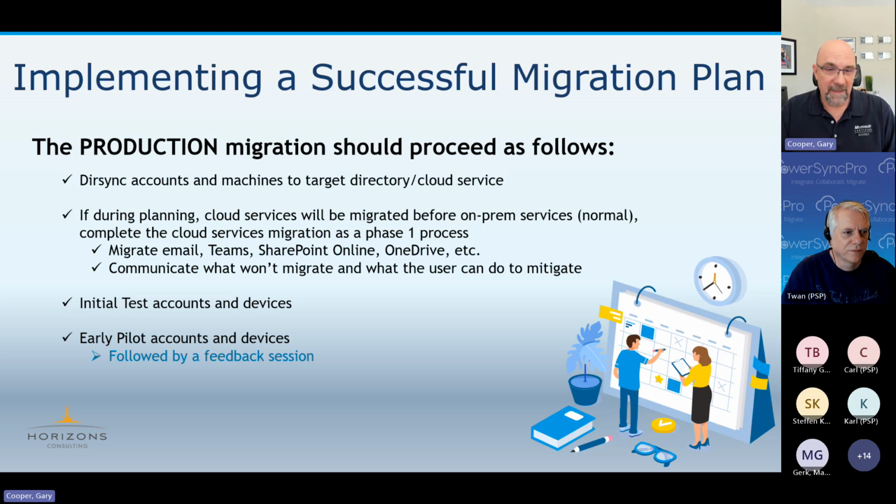Then we start into piloting. You're going to end up picking pilot batches. Obviously, you can start with some of your friends in IT and some of the people who are going to be most understanding if something goes wrong. You want to try and formalize your feedback. It's not enough to just say, hey, let me know if there's a problem, especially for IT users, because IT users tend to fix the problem on their own and not communicate what they had to do. Especially if they think, well, I knew it was going to be a little painful, so I'm not going to worry about it, and so forth. You need to know everything that went wrong.